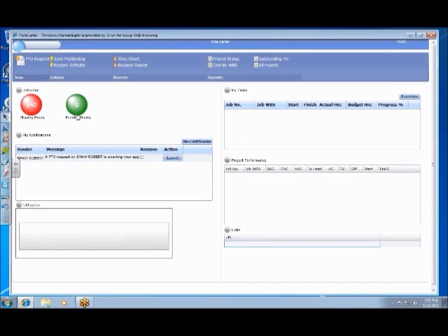Any jobs where you are a project manager, you could get a funding alert, and it's going to read the jobs you were assigned to as the project manager and look at where the amount spent is at or above 75% of funding. So it's just going to tell you the job, your funding, and how much you've spent. You will only see it once it hits 75%. Notifications.